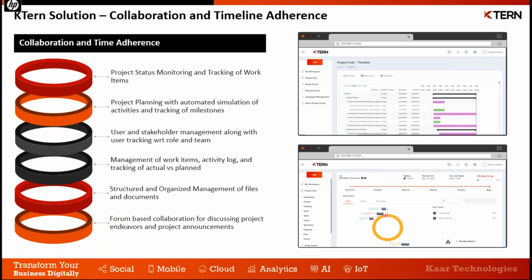The maintenance of structured and organized management of files and documents across each task in the project helps in documenting the process, and this can be fine-tuned as we go through multiple iterations. I cannot stress the benefits of documenting such complex projects. The key is the documentation is being available for each mock run, and even before you start the next mock run, the next activity, and you're no longer people dependent because you have the complete process documented. You know what was run in the previous run, you know how long it took, and you know what to expect.